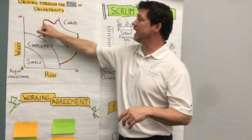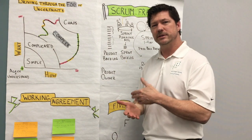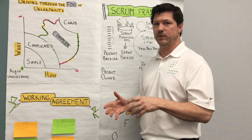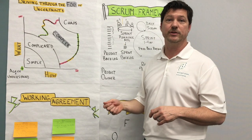We also have, again, the hash marks. Those hash marks aren't milestones anymore. They're truly done pieces of work on our sprint that we're demoing. Dev and QA, product owner accepted. We really know where we are. Not percentage complete, actual working software that we could ship if we wanted to.